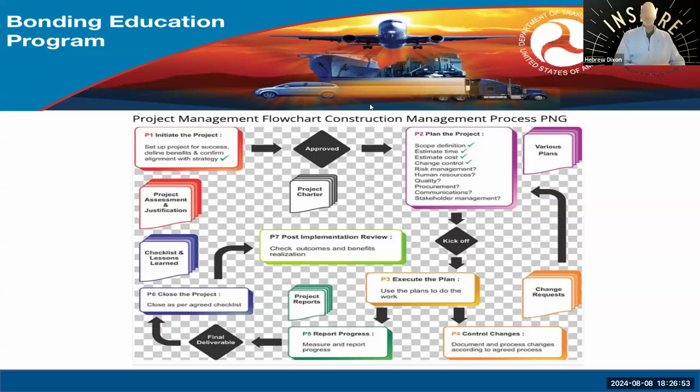So you want to make sure you have a clause in your bid that talks about needing time to assess the numbers once they say your go. Because once they say your go, you've got to ask, are there any extenuating circumstances in your world that impacted that project from a cost or schedule perspective?